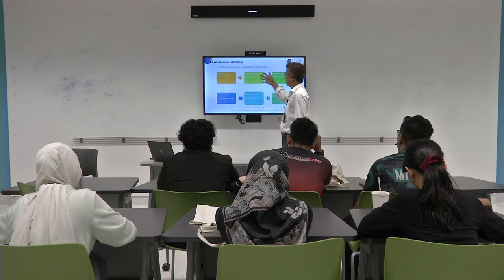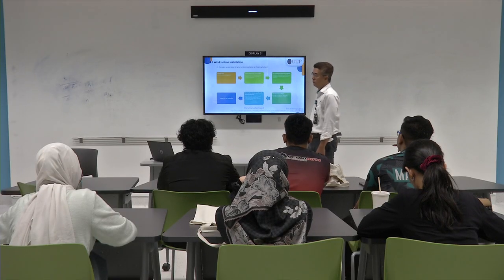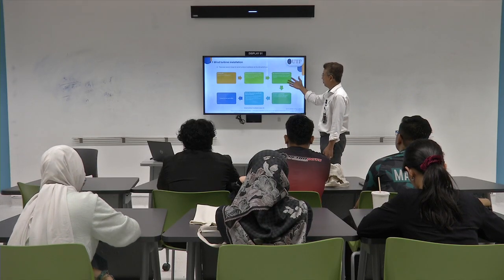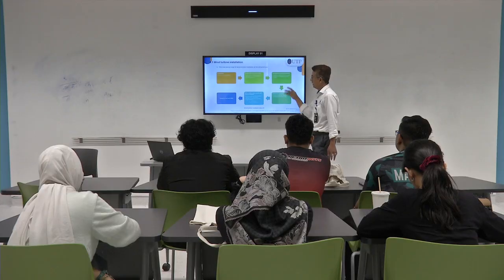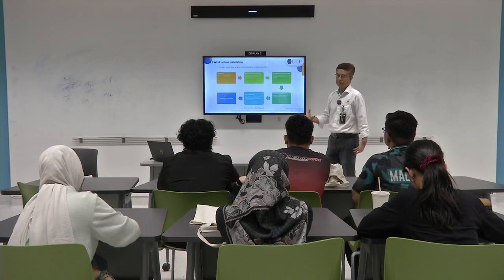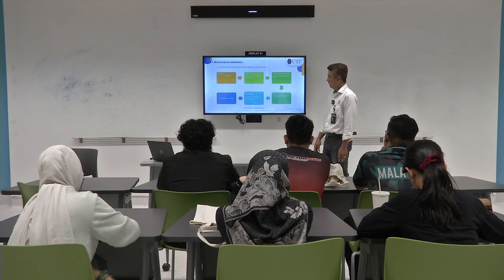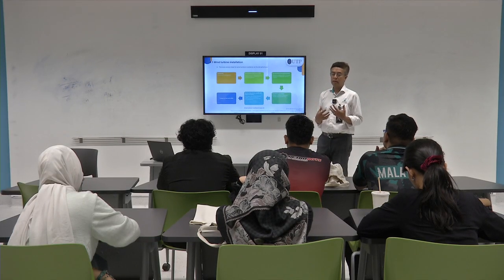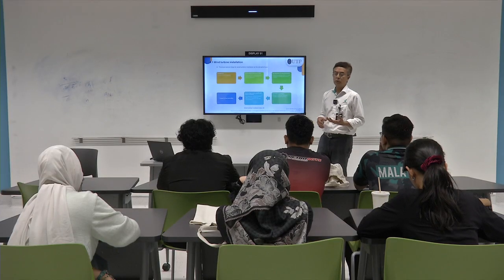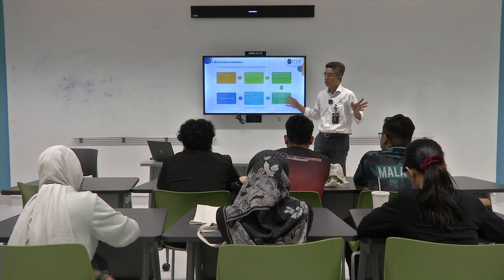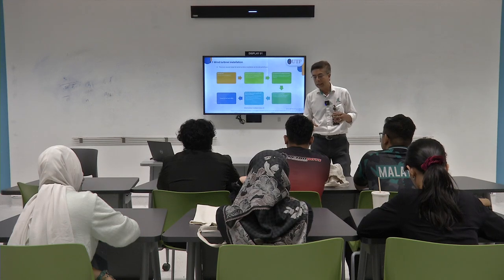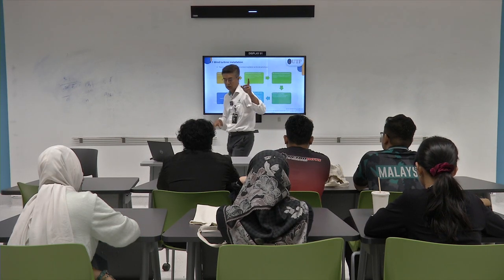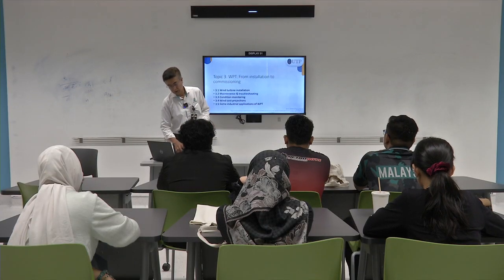Okay, steps. This is very common to everyone. This is all the basics. Clearing the site, constructing the road if it is onshore, and then determining the foundation process. Then you need to put everything together. If it is onshore, it will be easier to carry on all these things. But if it is offshore, then you need to worry about bringing everything over on a big ship and installing it piece by piece offshore, which is very, very expensive.